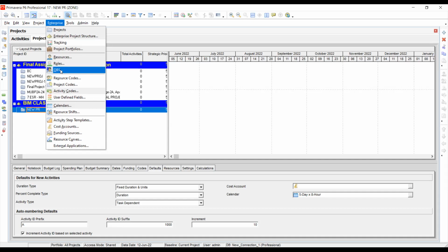We give the tasks to particular responsible people, and we have to allocate those through this OBS. Otherwise, when monitoring, we don't know who is handling which part and which project. Those activities we have to monitor from the head office. That's why we allocate this organization breakdown structure for the program.